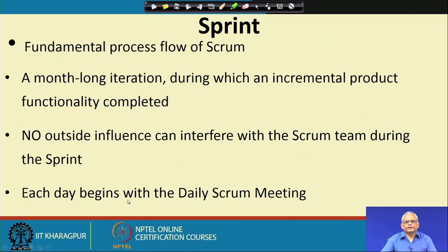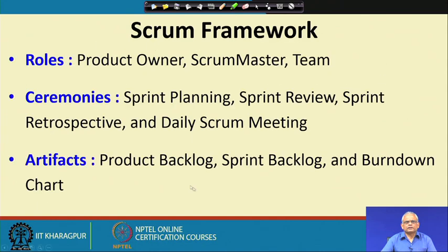And during the sprint, each day starts with a daily scrum meeting, where a review is done about what was achieved yesterday, what to do today, and whether there are any obstacles that any team member is facing. These are some of the terminologies in the scrum framework.